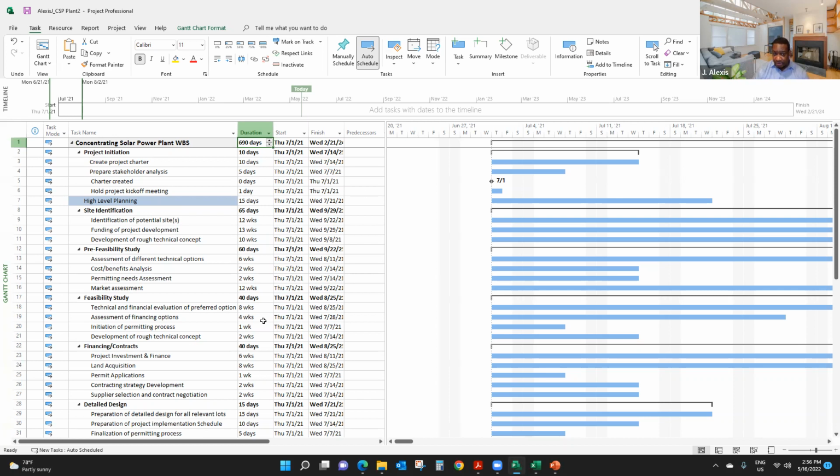It's not going to be a problem because project will use 5 days for 1 week. So if you have 6 weeks, project will say, well, that's going to be 6 times 5 days. And project will also take into considerations holidays that you enter in the computer, etc. Right? So those are things that we need to take into considerations.